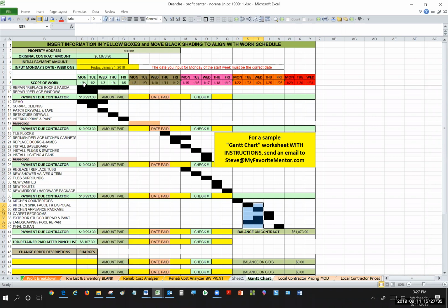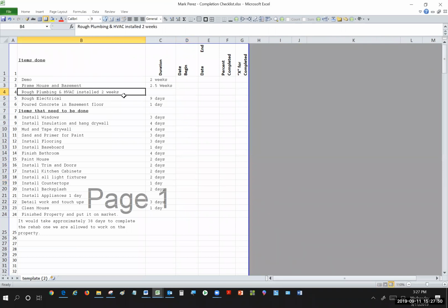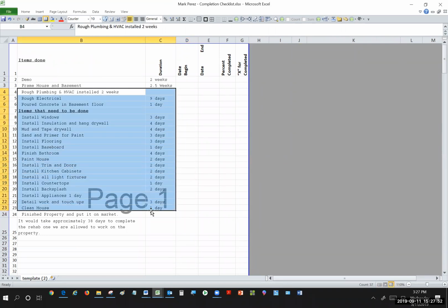Most contractors don't want to do that. And if you want to compress your job down from 3 months down to 6 weeks, this is the way you do it, by determining what work can be done simultaneously. And in order to do this, we might have to take both of our contractors and suggest that we bring in new subs.